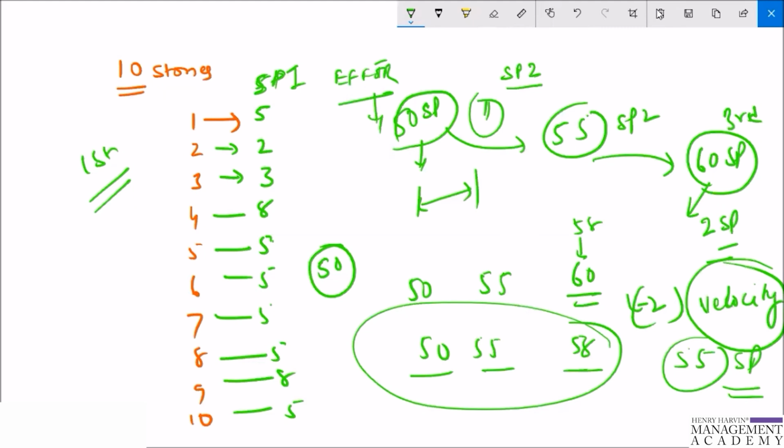right? So what is happening here is that we estimated the effort. Once we have estimated the effort, we have taken the velocity into consideration, that after certain sprints we are going to take an average of at least 3 sprints to find the velocity of the team. Now the important point here is that the team needs to put in effort to make this velocity sustainable, so that the product owner, the scrum master, and the development team understand how much work they can complete in one sprint.